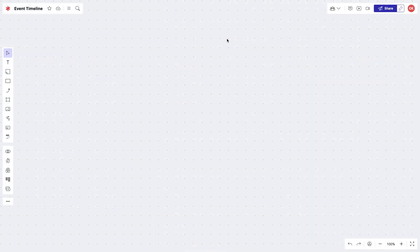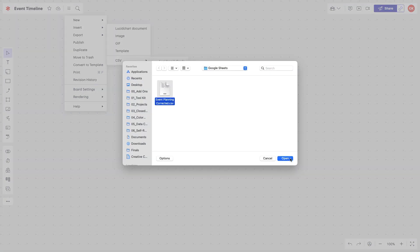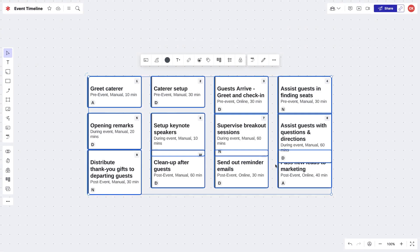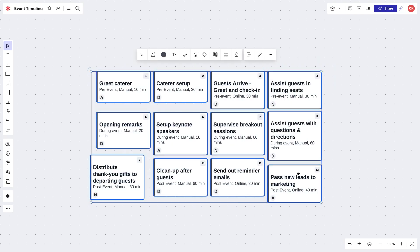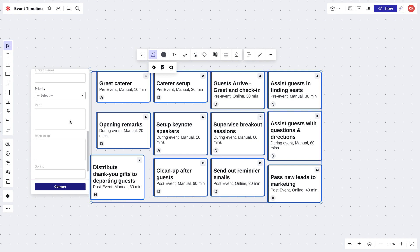Now we're ready! To import spreadsheet data into Lucid Cards, go to the hamburger menu, select insert, CSV, Lucid Cards. Select the file you want to use, and then help LucidSpark import your information correctly by selecting the corresponding columns from your spreadsheet with the related Lucid Card categories. Select import, and just like that, we've got our Lucid Cards on the board. My colleagues and I will collaborate to determine who does what and where we could potentially fit some of our new ideas based on our survey insights. We'll use the LucidSpark Jira integration to convert these tasks into issues and add them directly to a Jira project where they can be stored and ready to go for next year.